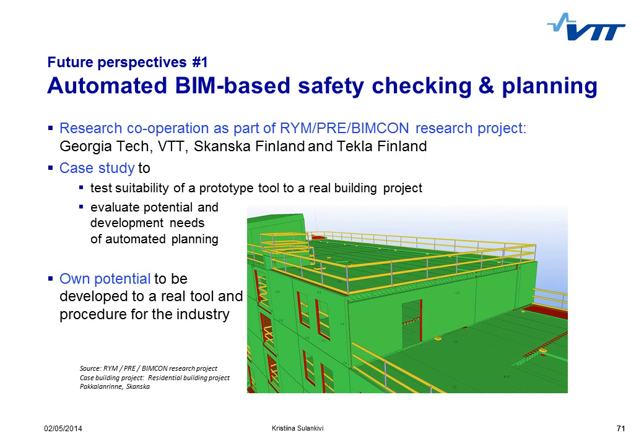needs of automated planning. This test trial showed us that the prototype can create a rough fall prevention plan automatically and fast based on a BIM-based 4D construction schedule, and the resulting fall protection plan can be flexibly corrected by a safety specialist. I would say that the tool and automating safety modeling procedures really have potential, but further development is needed before the tool can be used in real projects by construction professionals.